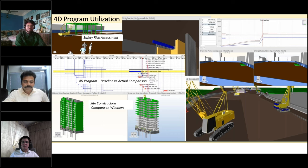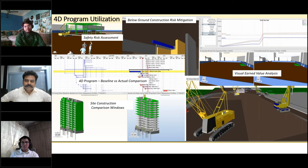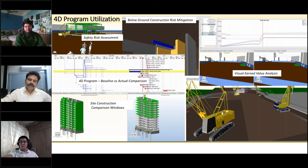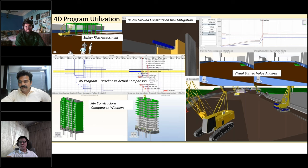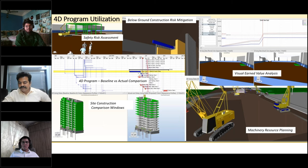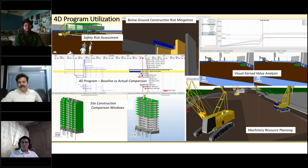We can do comparative analysis with multiple windows: baseline windows, actual windows, and projection windows. Coming to risk — risks occur in different ways, like unforeseen ground conditions or unforeseen space constraints. We can model and identify those risks and mitigate them in the early stages of program development, which is totally not available in 2D schedules in the current market. Further, we can do visual earned value analysis with a graph and comparative windows, and plan machinery resource movement on site — checking space availability and whether constraints have been mitigated.